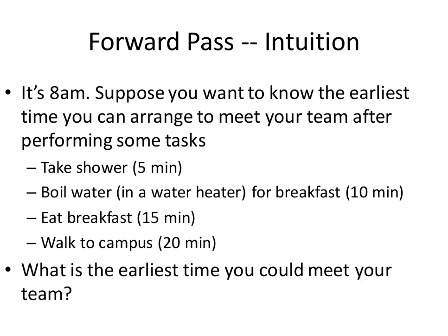So you have time actually to use a bit more soap, lather up a little bit more with your hair, and still not delay your breakfast, right? That's the critical path here, boiling the water up to this point. Then you can eat breakfast and you can walk to campus, okay? Now, arguably, you can eat breakfast while walking to campus.